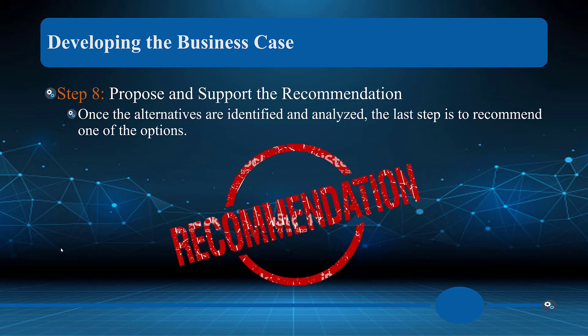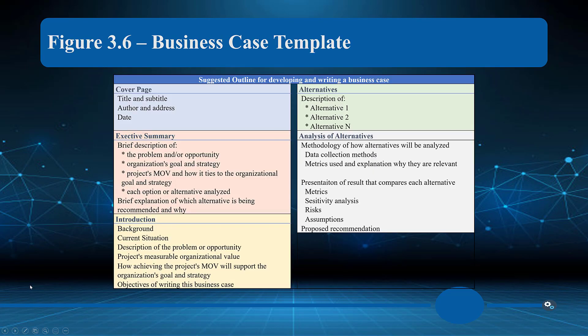When proposing and supporting a recommendation, I always include at least two to three alternatives, because I can end up being biased toward the project I've spent time on. It's not my decision — it's executive management, stakeholders, and everyone affected by the project. As the IT manager or project manager, I need to make sure it matches the organization's needs. Once alternatives are identified and analyzed, the last step is to recommend one of the options.